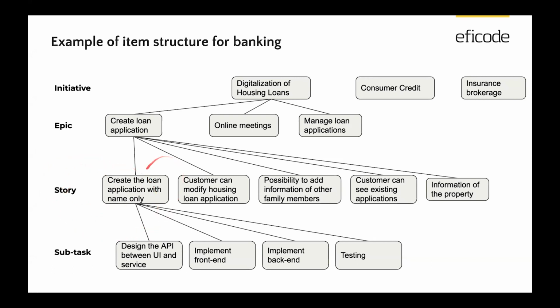So the stories should be something that are really a team effort. Quite often we see that teams are creating this kind of implement front end, back end already in the backlog. And what happens then is that the backlog expands, and it will be a huge long list of items. And then managing those is really hard. So try to formalize the stories, and then you can break down the subtasks if you need those. We will demonstrate how it looks today.